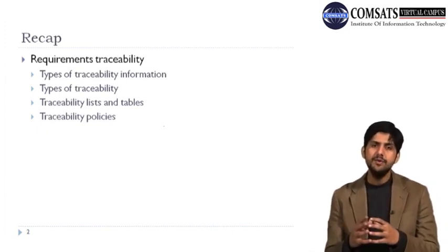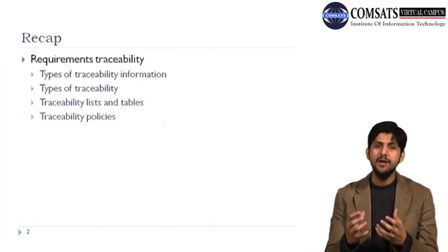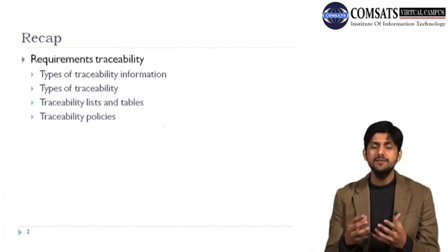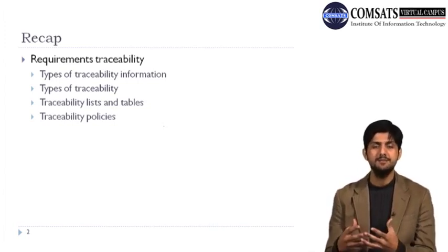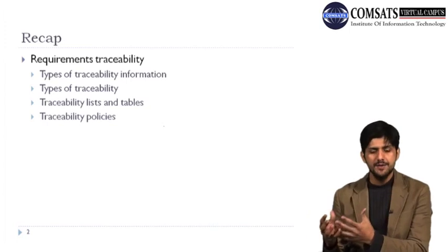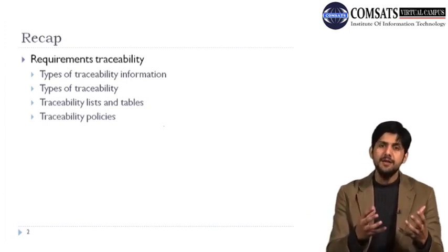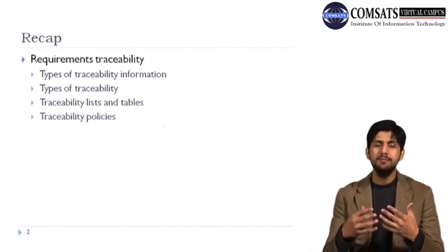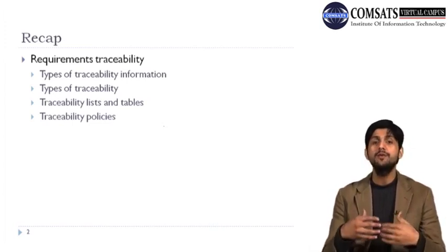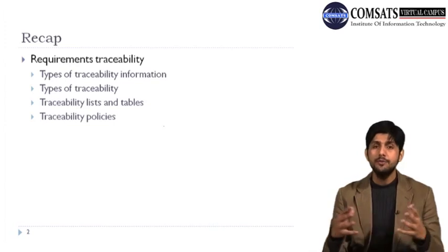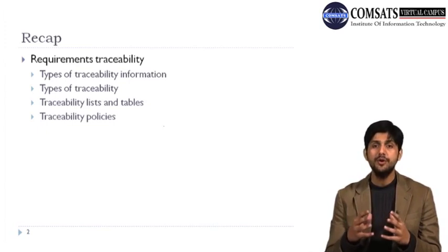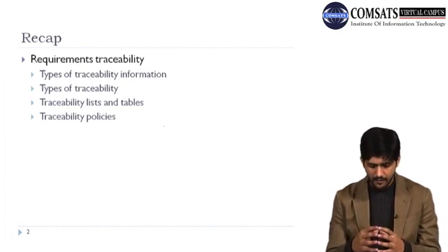Then we take it further. We try to analyze the impact of these requirements on design specifications. And following the design specifications, we also try to understand the impact of these design specifications on the code modules. So this traceability information enables us to calculate the impact of a requirement change on all the product activities, and through that only we can estimate how much the product is going to be delayed or how much more we are going to spend on the product.